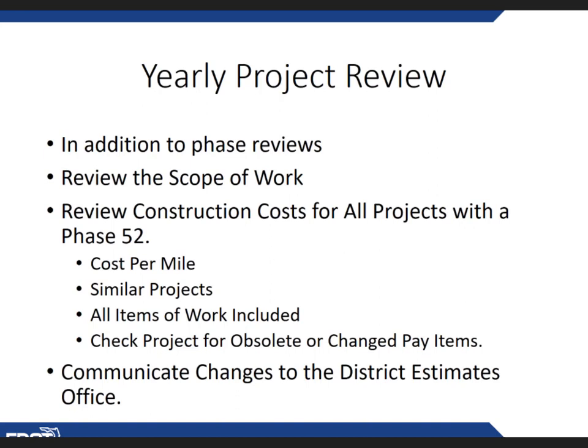During this review, you as a project manager will be asked to review the scope of work, update the construction cost, and communicate those changes to the district estimates office. The estimates office will communicate the changes directly to the district work program office.